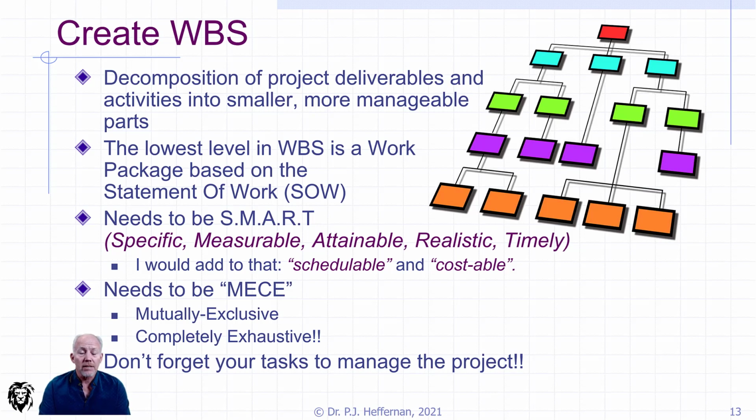The other one is collectively exhaustive. If everything isn't finished at the end of it, if you do all of those packages and there's still stuff to do, then you haven't got enough information. You've missed things. And so it has to completely exhaust the work required to do the project.